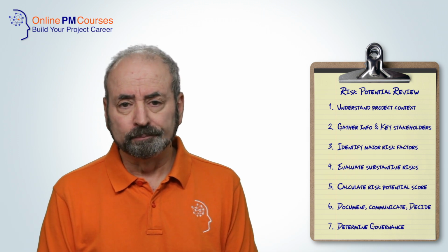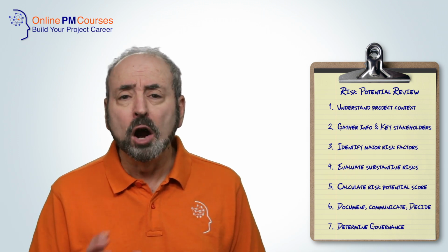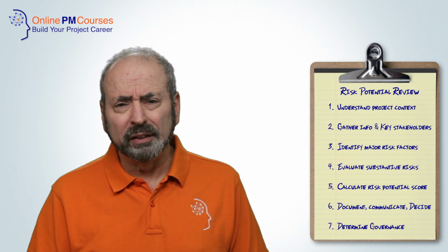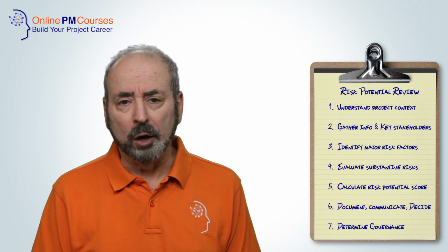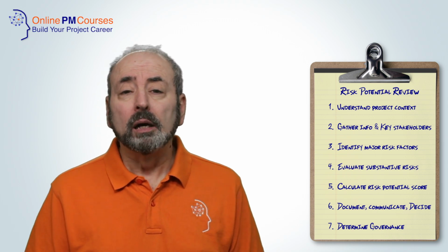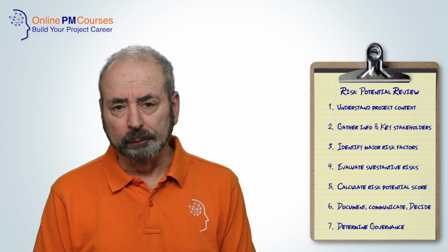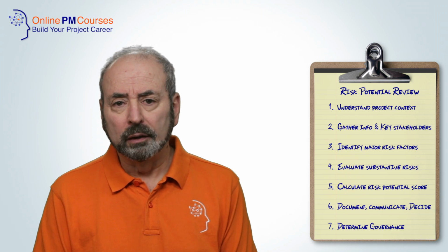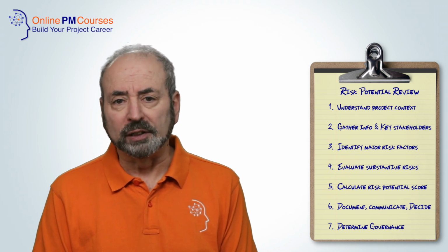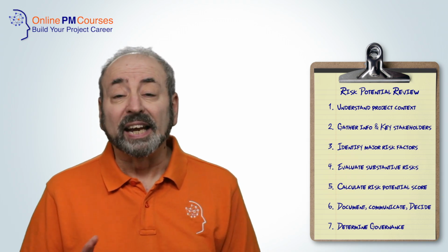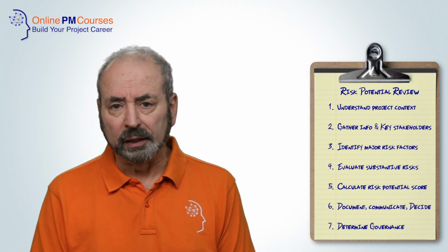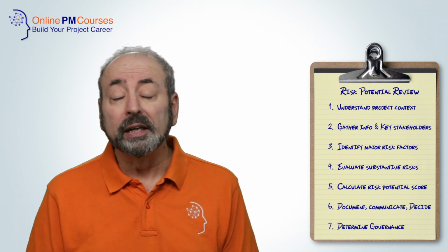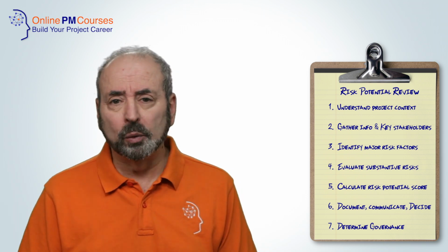the project. For example, a low-risk project might see monthly reporting and light-touch oversight from a PMO. Medium risk might see bi-weekly reporting, a dedicated risk owner, and oversight by a project board. And a high-risk project might see weekly steering group meetings, external audits, and a contingency budget of at least 20%